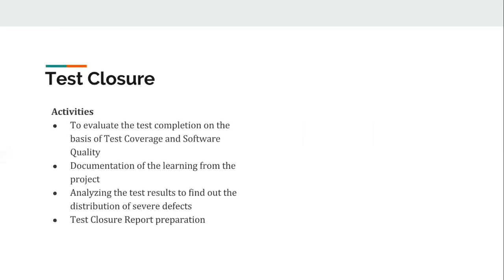So we should be sure that all the requirements have been tested. And it can be done with the help of the RTM that we prepared in the test planning phase. Then documentation of the learnings from the project, analyzing the test results to find out the distribution of severe defects, and the test closure report preparation should start in this phase. The deliverable will be only the test closure report.